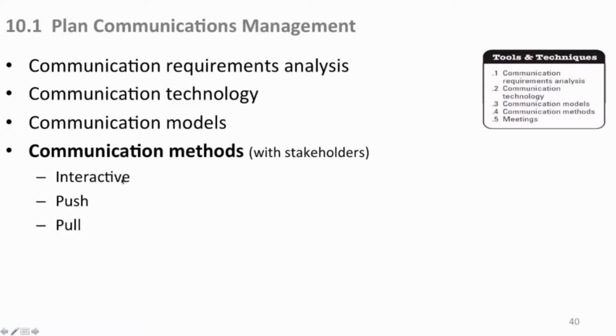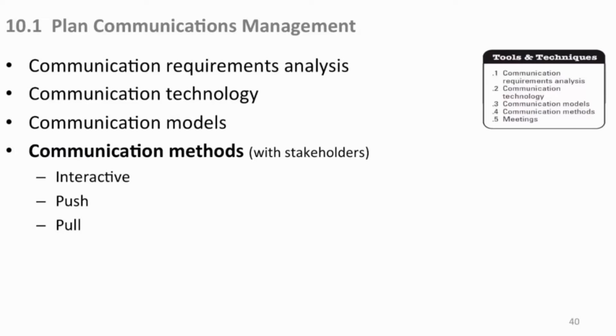Interactive is two people talking together, a phone, video, whatever, two people interactive. What we're doing here now, you and I in this course right now, I'm doing a push. I'm pushing my information to you, okay? And you, because you called up this video, you're pulling the information to you. That's push-pull. It's one way or the other, push-pull, if it's not interactive. And those are methods of communicating with your stakeholders.